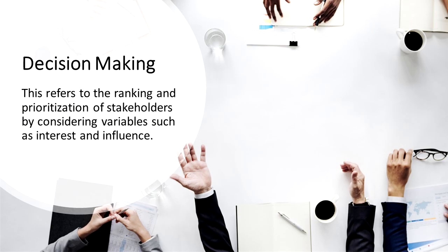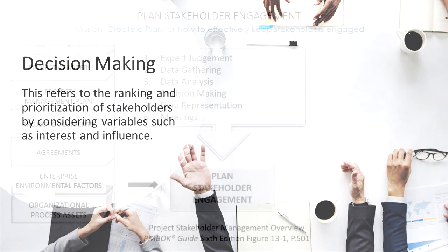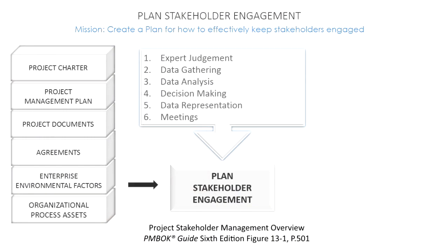Remember, our stakeholder analysis uses the power interest grid, those who we monitor, those who we keep satisfied, those who we manage close, and those who we keep informed. You need to know this breakdown for your exam. Very important. Our next tool and technique here is data representation.